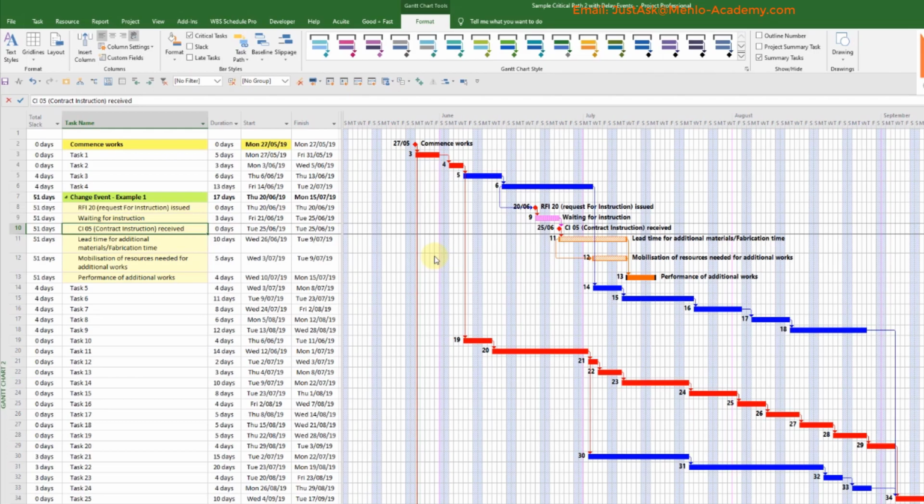You have to wait for mobilization of equipment to become available, for it to arrive at the site and be delivered. Likewise, any materials or fabrication work that's needed, it's all lead-in time before being able to actually carry out the work. And the way you would show it is, I've got here 10 days lead time for fabrication or availability of materials or whatever.